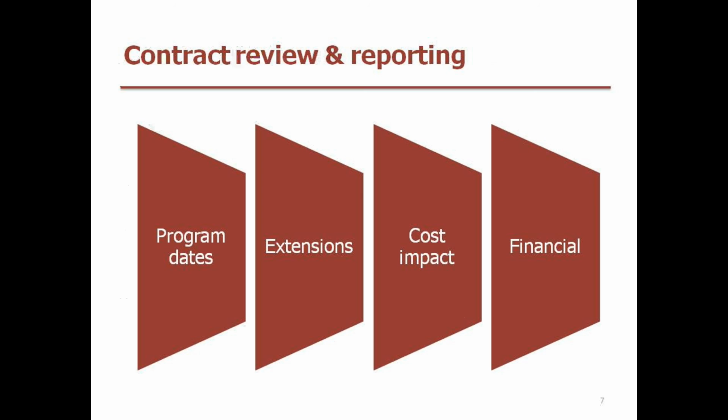Things like time: the original completion date versus the forecast completion date, whether there have been any extensions or interruptions in that program, the cost impact of changes, claims, and cost impacts also of time changes on the project, any change on fixed price contracts or methods of recovery, and also a realistic financial assessment of variations, rise and fall, must be made substantial to the client.